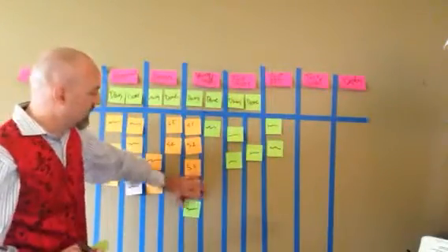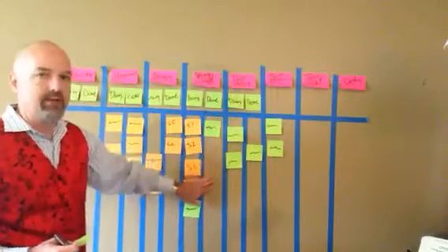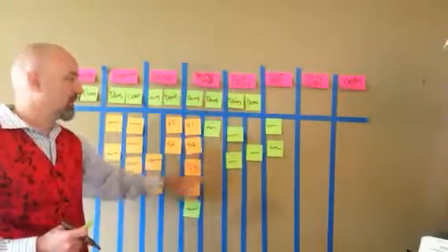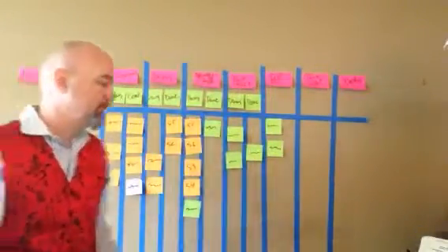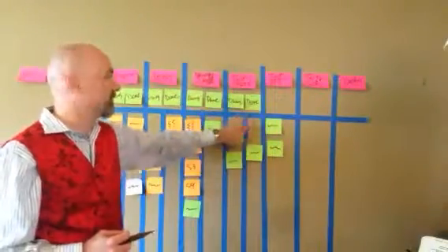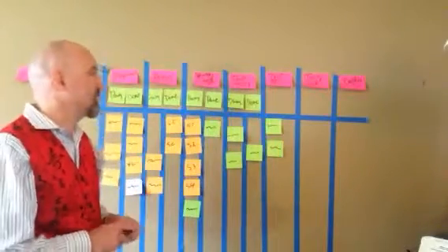You can start to see, oh, wait a minute, there's a whole bunch of stuff here and nothing's getting to the done column. Maybe there's a problem in this part of the work. Let's take a look at that a little bit more deeply. Taking this another step, or 10, to make it a Kanban chart would be some more work.